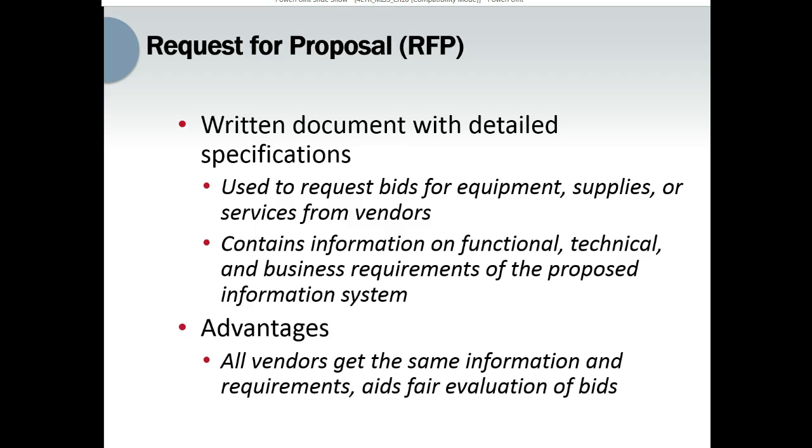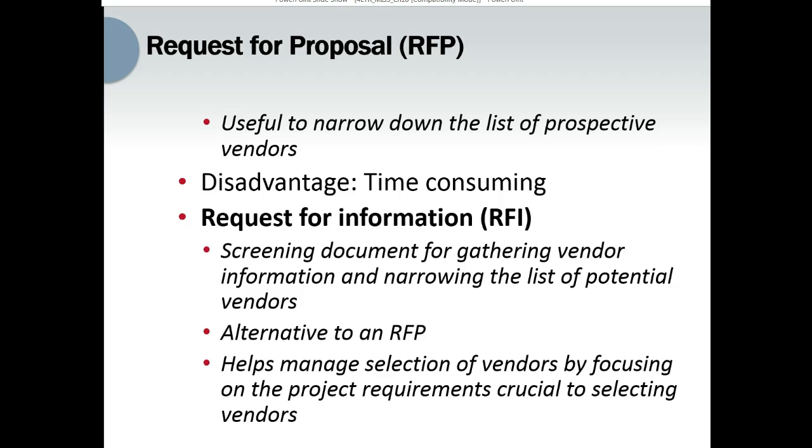The main advantage of an RFP is that all vendors get the same information and requirements, so bids can be evaluated more fairly. Furthermore, all vendors have the same deadline for submitting bids, so no vendor gets the advantage of having more time to prepare for an RFP. Government organizations normally use this format, the RFP. It has some disadvantages, and one of the major disadvantages could be that it takes time to develop it and to evaluate the different proposals that you get.